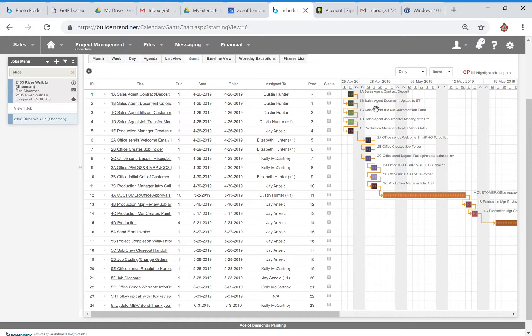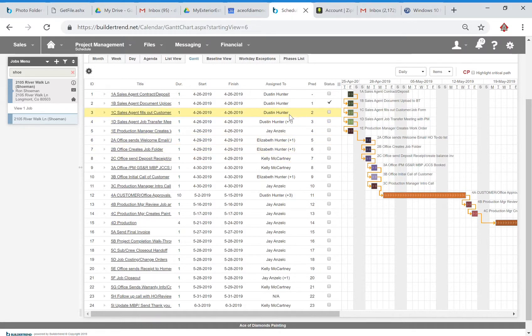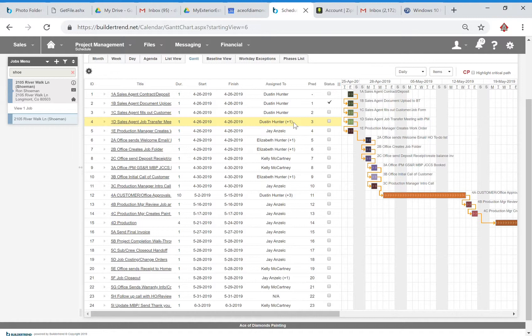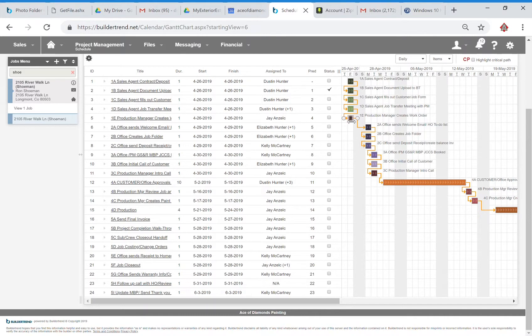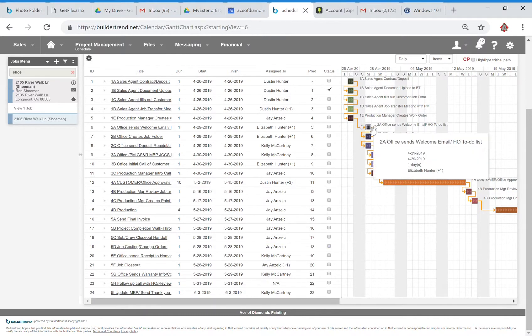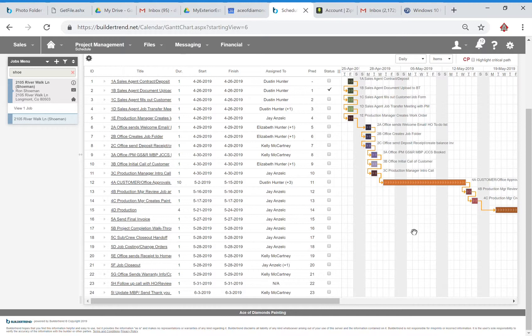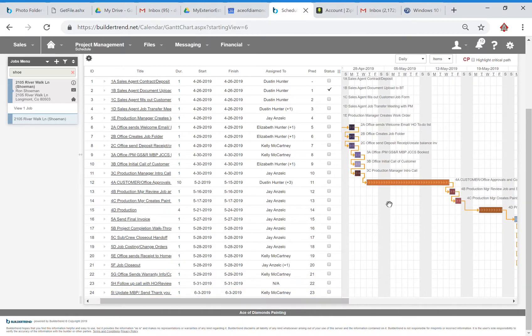We know that the documents, those look good, so we'll go ahead and mark those completed. Customer job form, right now that would be the internal notes. We've got a couple other areas that we ask for information there so be on the lookout for that. Sales agent job transfer meeting, so that's going to be a discussion between you booking the job and the project manager in terms of what the job all entails. Then we've got the production manager creating the work order and then a couple other steps that kind of need to happen along the way that are more involved with the office manager and the production manager.